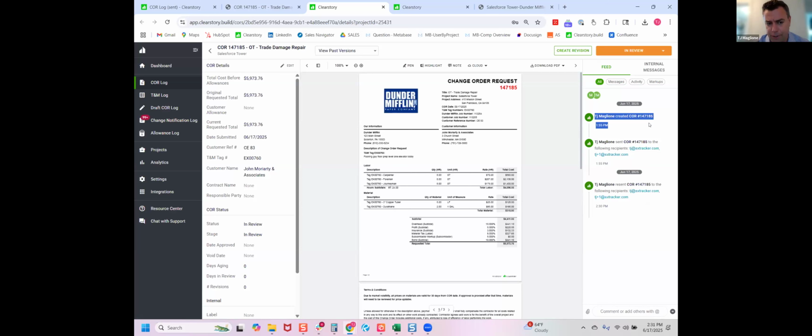Like I said at the start of the call, most change order disputes or long-term reconciliations are not because of merit of scope, right? The drawings changed, there was a scope change. There's merit to dollars being added to a contract, or a GC says, "Hey, it rained on Friday. We're doing the concrete pour on Saturday." There's merit to the work that somebody asked you to do. Most of the reason there's dispute is I got the information late. I can't read it. Did you send it to me? Where's the backup?